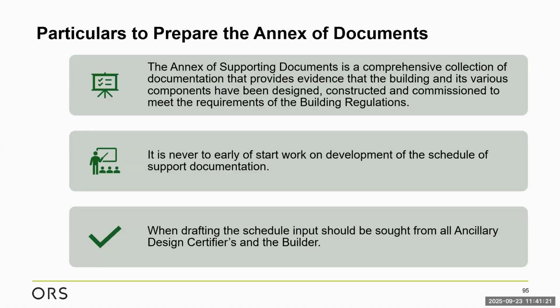On my projects, what I like to do as early as I can, once construction work starts, is put this schedule together and present it to the build team and say, look guys, this is the documentation that we have to provide prior to certification. And again, to say that this document is live right the way through the project, and it needs to be revisited. But as best you can, I think it's beneficial if we can put that picture in front of the build team at the earliest possible opportunity.